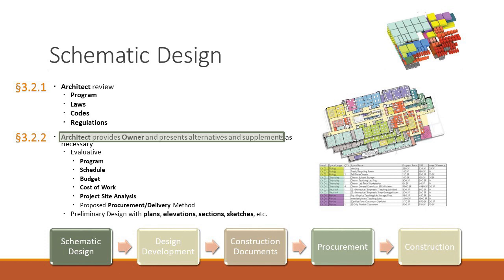This is where, if you look at it, it says budget for the cost of work. Remember, this is where you have that discussion. You understand, project owner, that this is only the cost of the work, your budget. Is that $10 million for just the construction, the materials and labor of the building, or does that include my price, the land, and everything else? That's part of your discussion there.